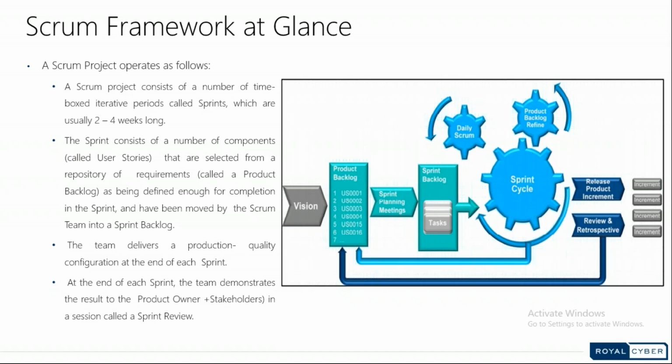In this way, instead of delivering a big chunk of code at the end of the project, which the customer has to review and then give feedback, again going through the change request process, we deliver incrementally. The customer sees the working product instead of a failed product at the end of the project, which has some issues or takes more time for the business users to accept.